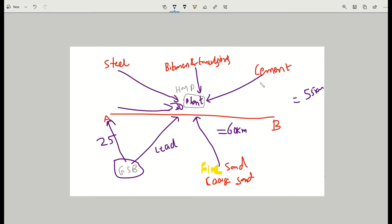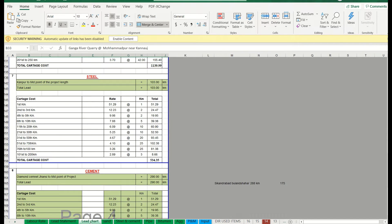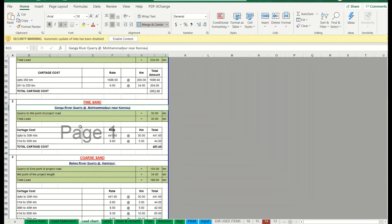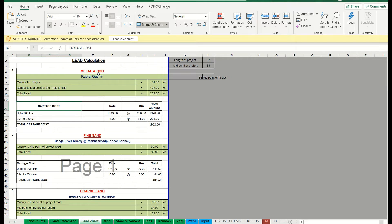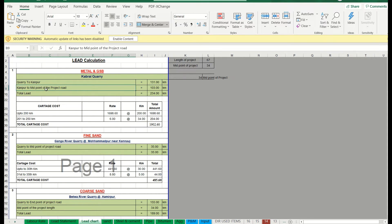Once the lead is calculated for each material, we go to the Excel sheet — the lead chart. Here you can see: length of project is around 67 kilometers, midpoint is 34 kilometers — that is the hot mix plant location from the start of the project. The quarry-to-Kanpur distance is 131 kilometers, and Kanpur to midpoint is around 234 kilometers total — so the total lead for GSB is 234 kilometers.